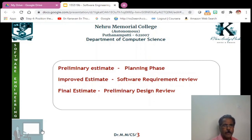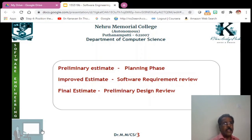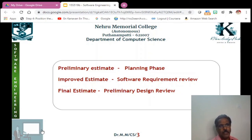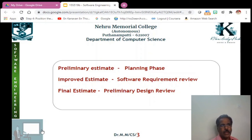So we can do the estimation in three stages: a preliminary estimate, an improved estimate, and a final estimate. A company can also engage more than one vendor for estimating the cost, compare them, and finally select a particular company for developing the software. Once the client is satisfied that the cost is viable, a contract is signed between the company and the client, with the final cost estimate given after the preliminary design.